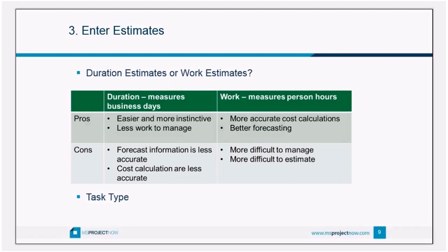Most organizations I've worked with estimate in duration — how many business days will it take — because the most important information they need is when will the project finish and is it going to finish on time. When you choose how you're going to estimate, that's when you know what task type to set. You can use fixed units, fixed work, or fixed duration. If you're making duration estimates, set the task type to fixed duration; for work estimates, set it to fixed work.